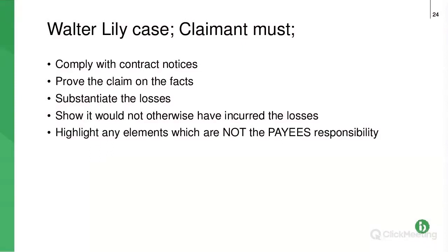Now, bear in mind, it is far easier if you've submitted proper notices, because you're not then having to argue this case and find that information to show that effectively the employer did know what was going on, they did know that there was delay and that there was going to be a claim. It's just that the proper formal written notice hasn't been sent. But if you need to argue this in meetings, that's the case that you need to be talking about.